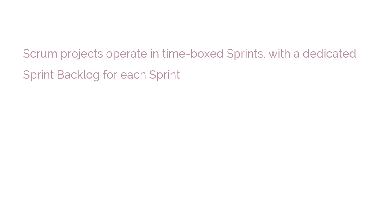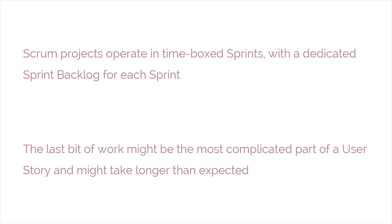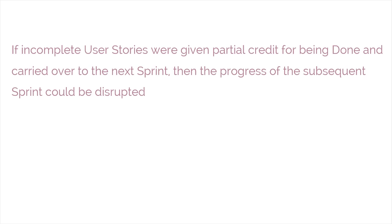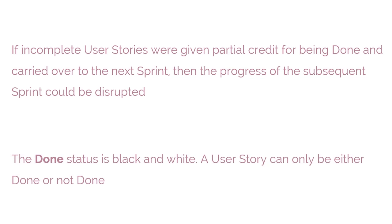Scrum projects operate in time-boxed sprints with a dedicated sprint backlog for each sprint. Often, the last bit of work might be the most complicated part of a user story and might take longer than expected. If incomplete user stories were given partial credit for being done and carried over to the next sprint, then the progress of the subsequent sprint could be disrupted. Therefore, the done status is black and white — a user story can only be either done or not done.